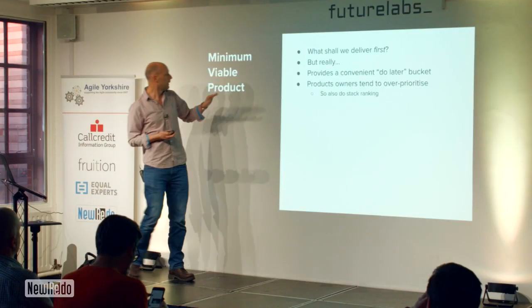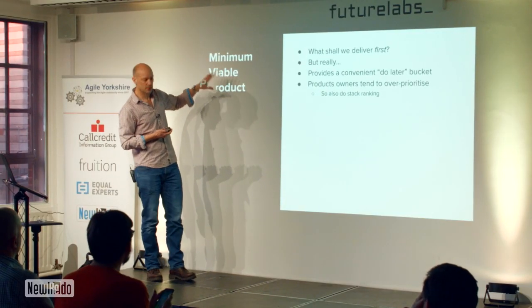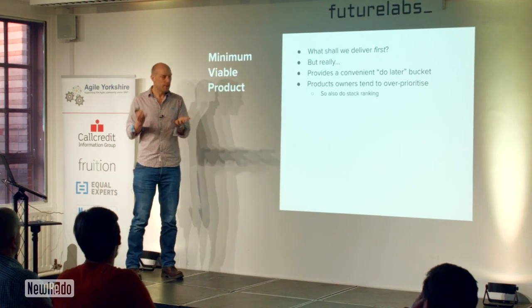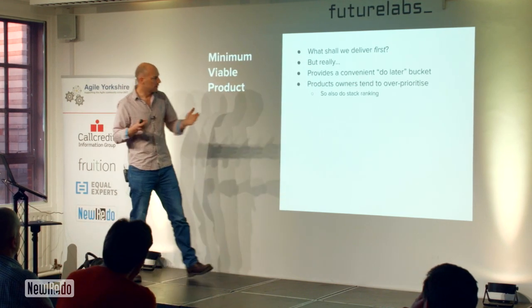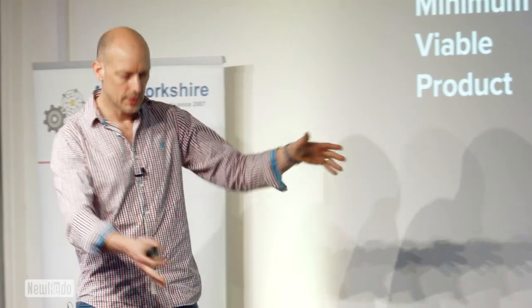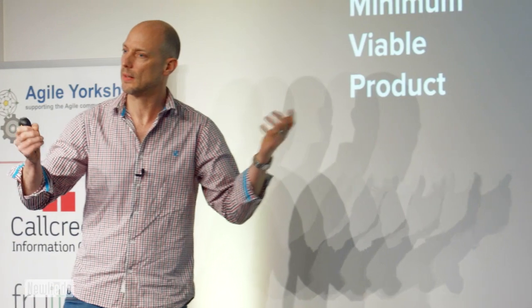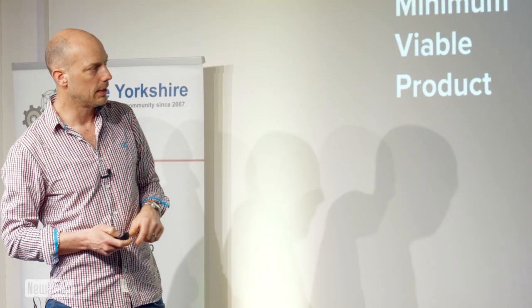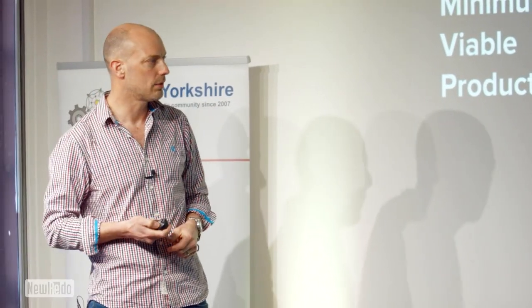So that's really important. An MVP is a good device to get a ready reckoning on what's going to go initially, but the stack ranking is really important. So don't fall into that trap of thinking, okay, all these things are in the MVP, we can do them in any order. Yeah, don't do that. Just really focus on doing the highest value stuff first.